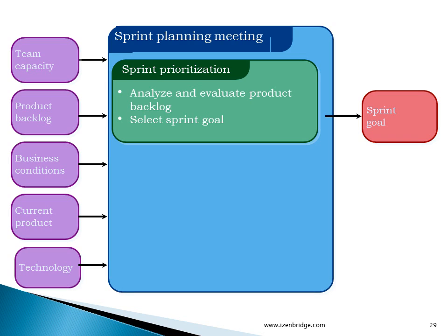Product backlog should be groomed before starting the sprint planning meeting. It is not expected that in a sprint planning meeting, the product owner and team are discussing the priority of the requirement. So the product owner should do the prioritization before, and during the first half of the sprint planning meeting, the discussion should be what all can be taken for converting into a functionality.